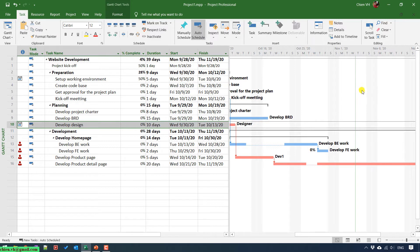You can see all of the tasks on the left side of the green vertical line seem to be running behind schedule, because when you look at the percentage of completion, we don't have any tasks with 100% completed. That means all of the tasks on the left will be behind schedule, and we cannot finish the project within the current plan. So you have to reschedule it to bring it back, and we need to calculate a new timeline for the project.